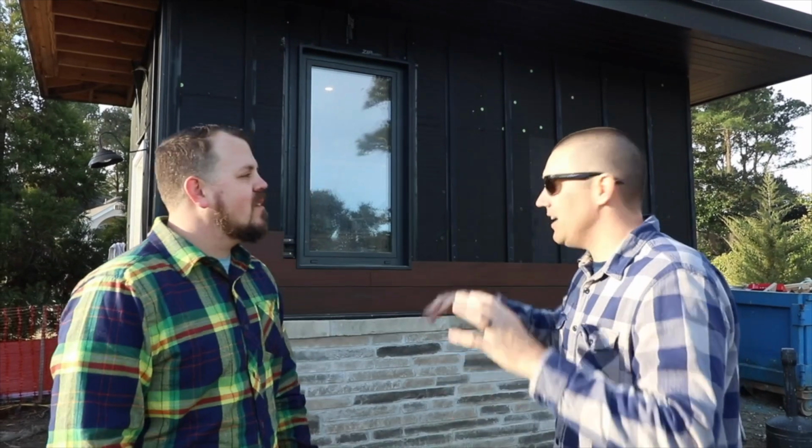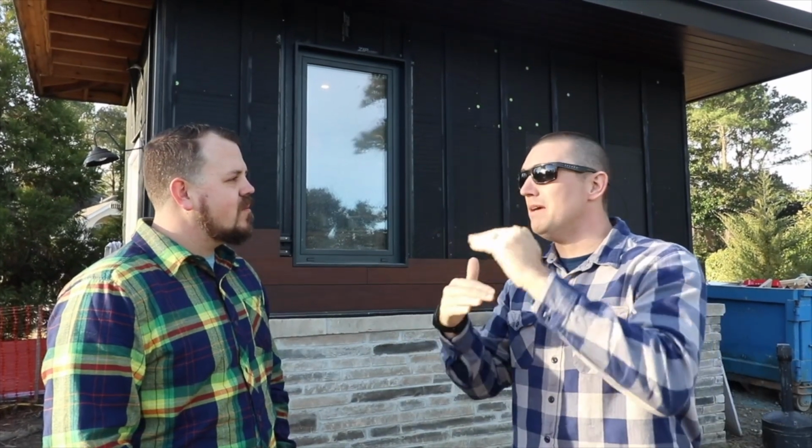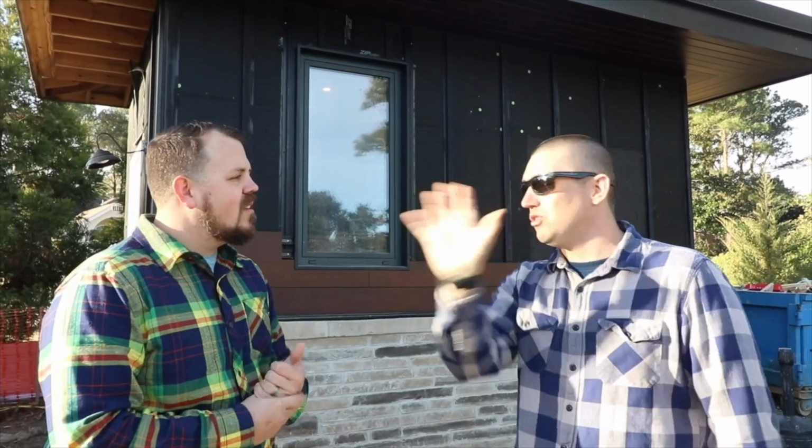And that's what happens on a job site. Rarely do you get everything perfect the first time around. Things look great on paper, but when you actually start working with your install team, you have your mason and your siding guys, your framers, everyone putting their two cents in on how this is all going to tie together for the structure and the envelope to work. Things have to get changed. Paper is easy to design on, but making it all come together is a whole other task that we have to deal with in the field. This lets us do this before we even start framing the structure, before we do the foundation. We can start thinking about how this is going to impact our foundation and where we need to put sills or blocks, so we can do it right the first time.